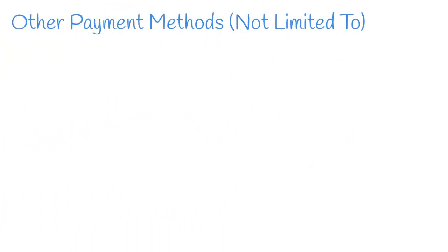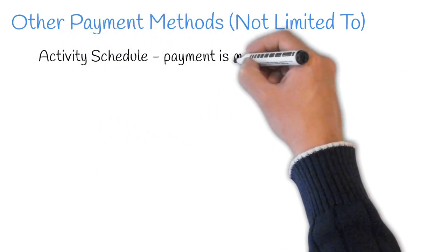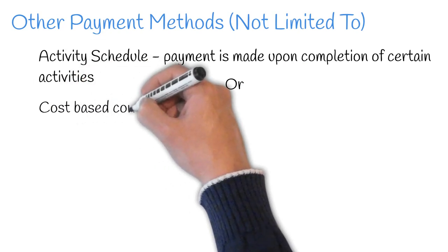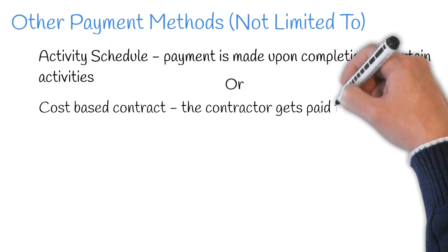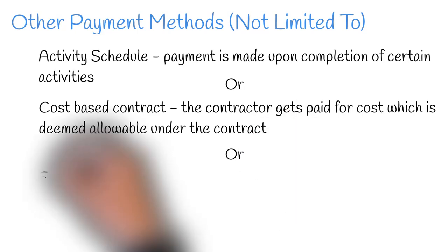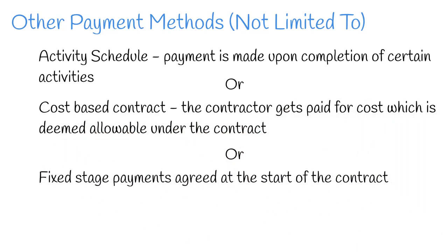Other payment methods will require a slightly different approach. For example, an activity schedule, where payment is made upon completion of certain activities; or a cost-based contract, where the contractor gets paid for cost which is deemed allowable under the contract; or fixed-stage payments agreed at the start of the contract. The type of payment method utilised will impact how the external valuation is carried out. However, the principle is still the same.